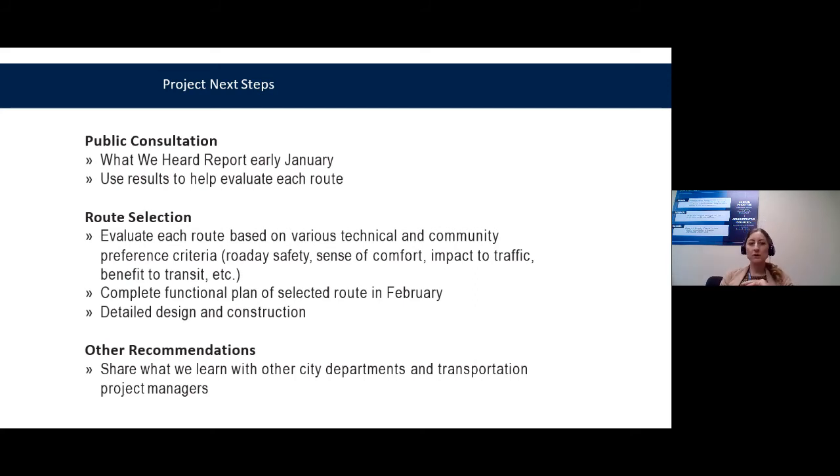I should clarify that when we say 30% design, that's still pretty high level, because you think of the design process as 100% of the design would mean that route is taken down to the centimeter, around the utilities and existing curbs. So that level of detail up to 100% is done during detailed design.